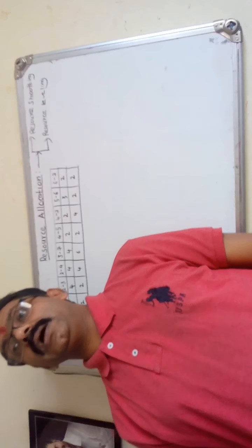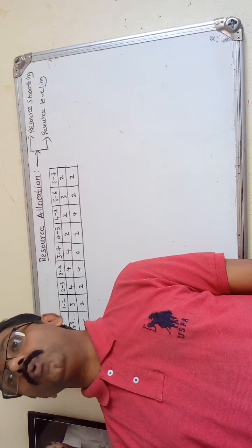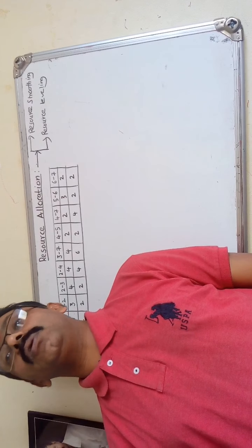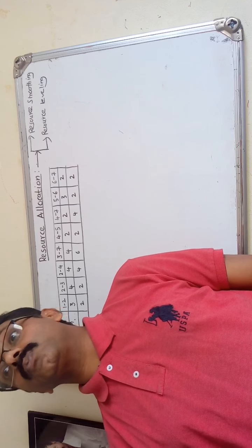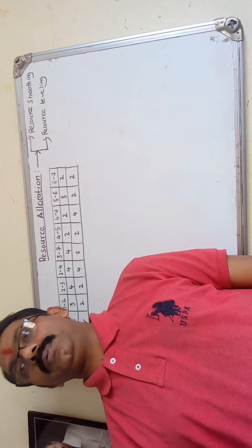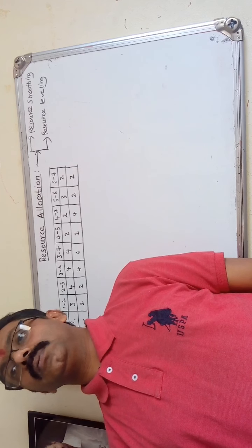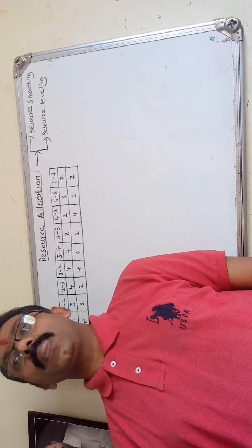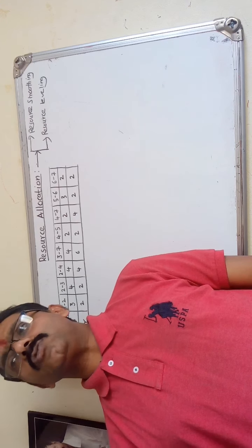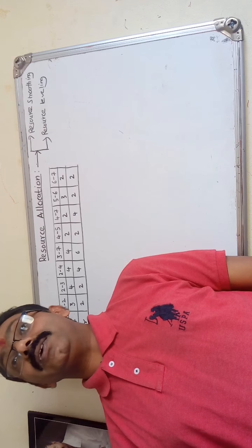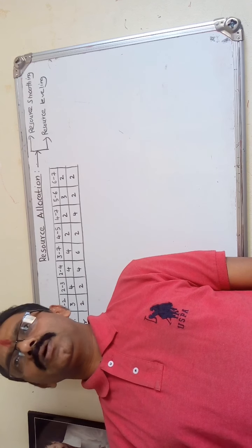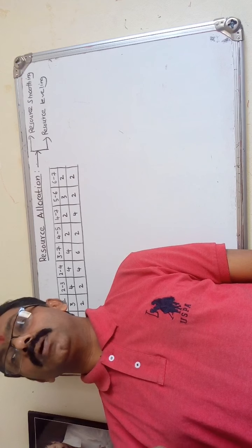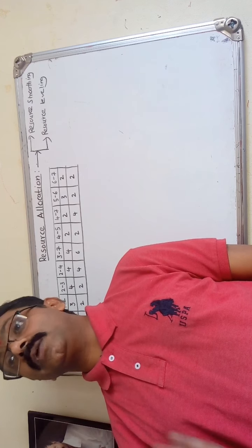There are a few concepts. We have to find out how effectively the manpower is utilized. For that purpose, you need to find out the effective force ratio before using the smoothing technique and after using the smoothing technique. There is a method where you need to draw a time scale version diagram, or time grid diagram, to find out the manpower requirement per day. There is also one more method, the EST solution method, means earliest start solution method. Using the earliest start solution method, you will also be able to find out the manpower requirement every day. We will see how to use those techniques.